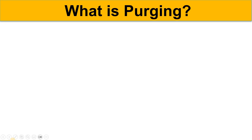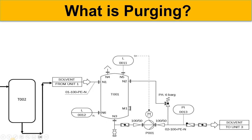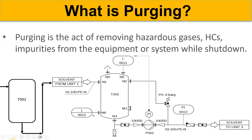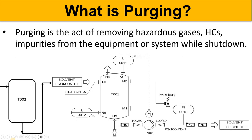Do you know that while shut down we purge the lines and equipment whenever we hand over our system to maintenance? So why is that purging required? What is the purging? We are going to discuss in this video. Hello, Core Engineering family! Basically, purging is the act or the process of removing hazardous gases — that could be anything: hydrocarbons, all the impurities.